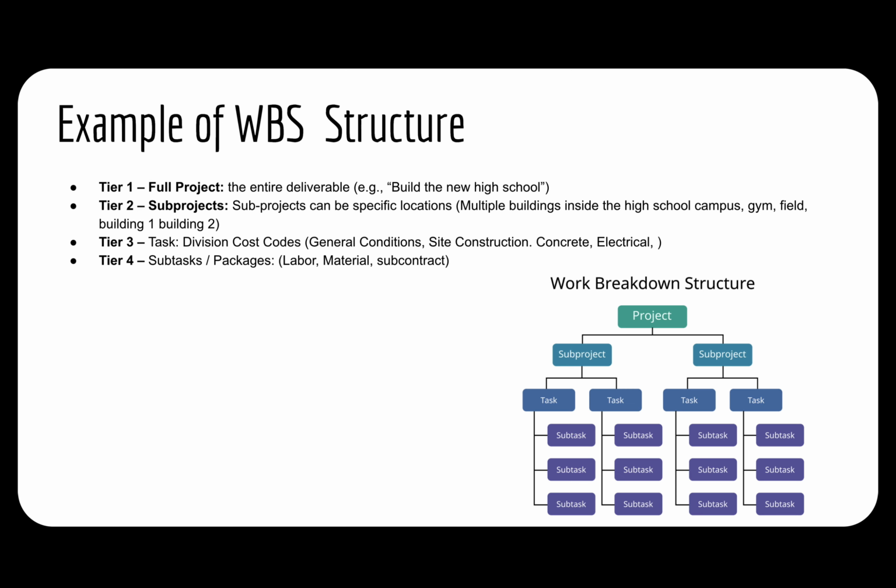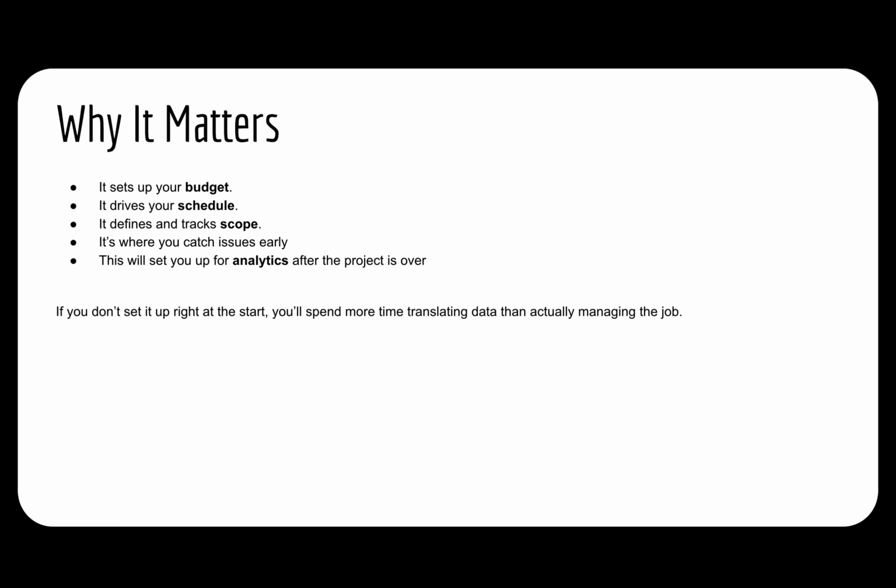And then you have tier 4, subtasks. So that's going to be your labor, your material, your subcontracts. Breaking down that whole entire construction project into smaller deliverable parts. Whether you're working on big projects or small projects, it helps you set a budget. It also helps drive your schedule. It defines the track of scope. This will also set you up for analytics after the project is over.